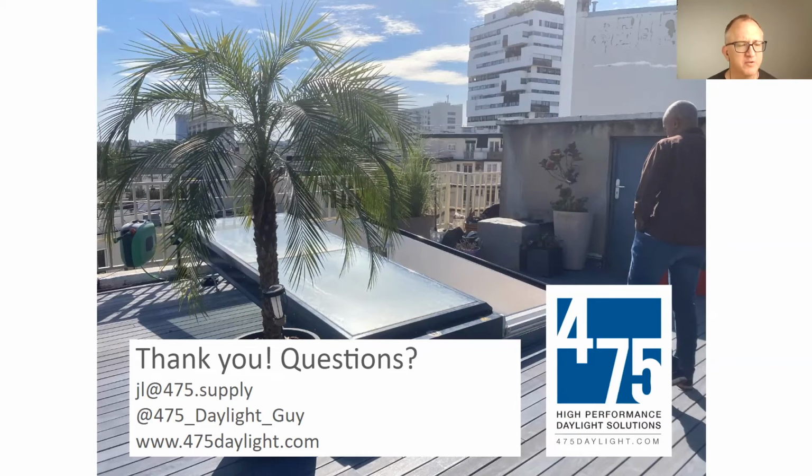Jeremy, what sort of lead time are you looking at this point for delivery of the product? So for the Comfort Access solutions, most of our products that we supply from Lamilux at the moment actually are going to have a lead time of approximately 20 weeks. Hoping to see some improvements in the near future, but at this time, we are advising everyone to plan for around 20 weeks, particularly with the upcoming holidays.